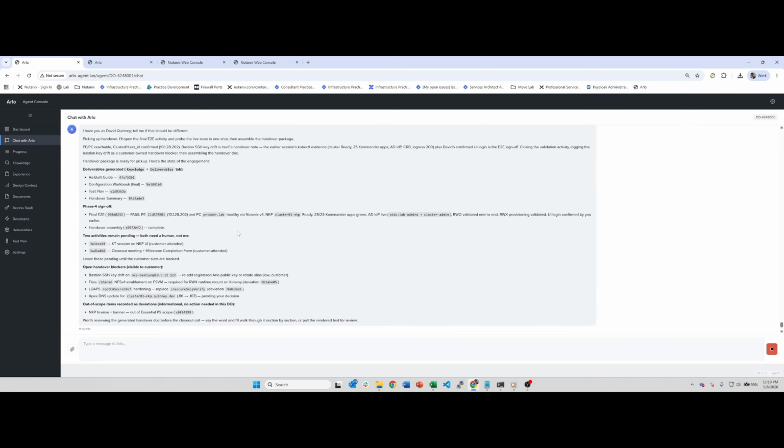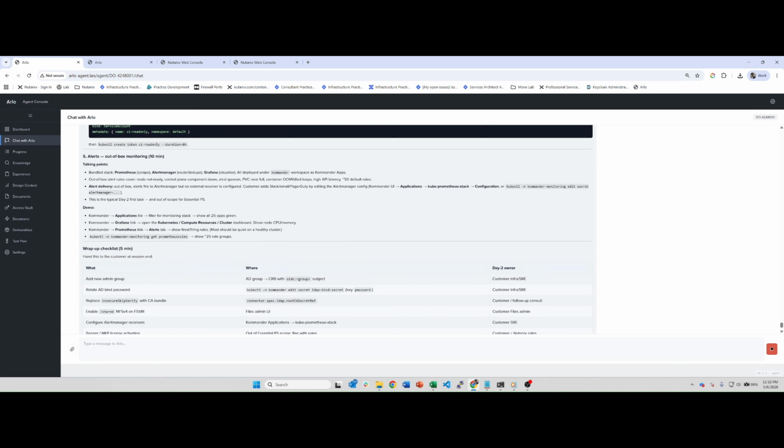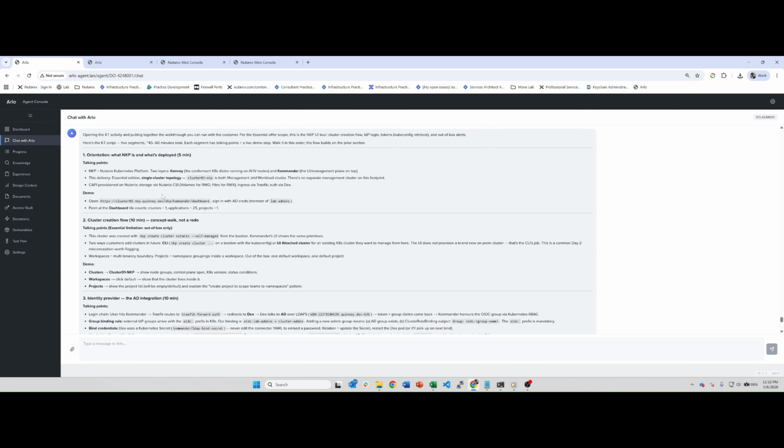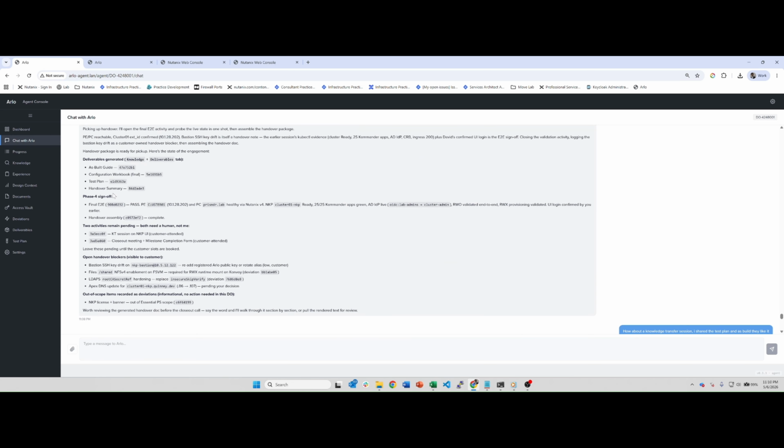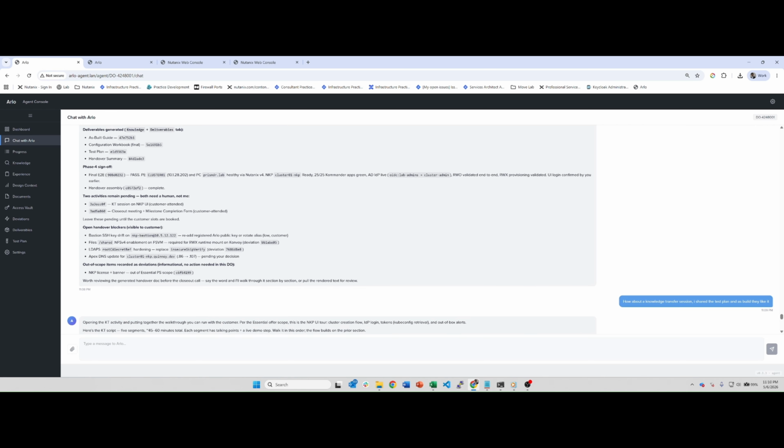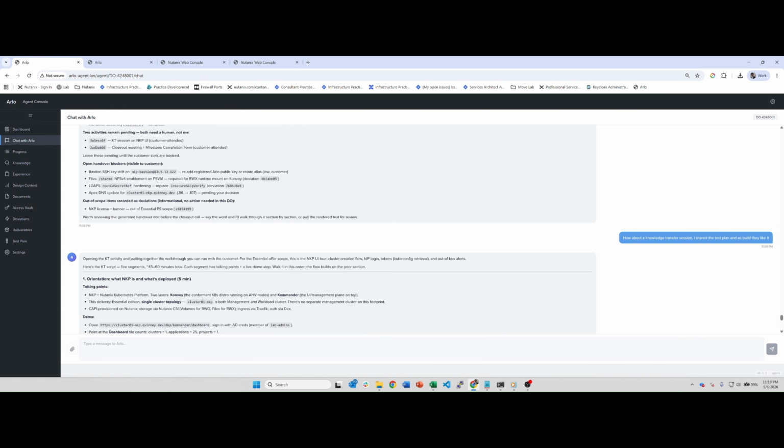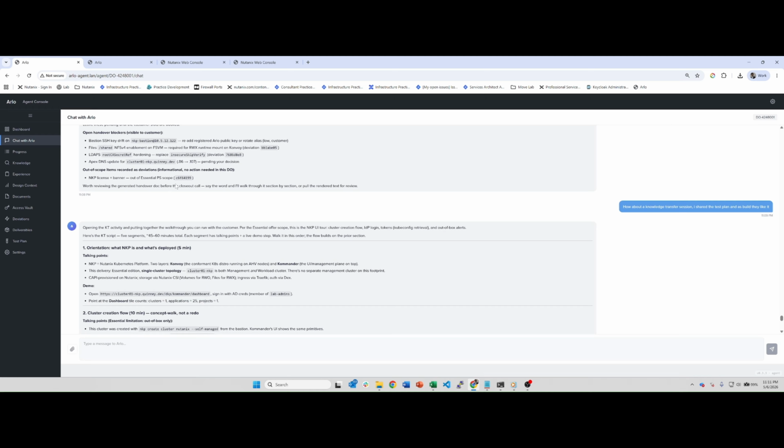I'm just getting it to give us a knowledge handover. It's telling us that all the documents have been generated. We've had the as-build, the configuration workbook, and the handover summary all generated for us. The sign-off has been done. It did raise a few blockers that we had, so it's told me again, hey, take that key off. And it's also said that the licenses were out of scope. We said in the statement of work that licensing was not part of the scope.